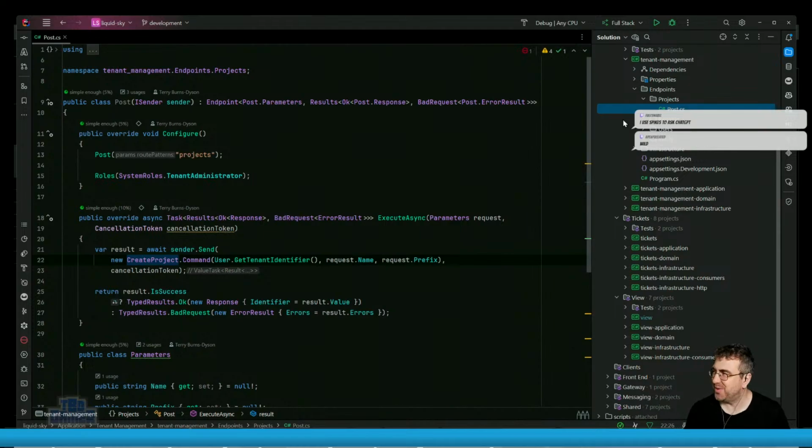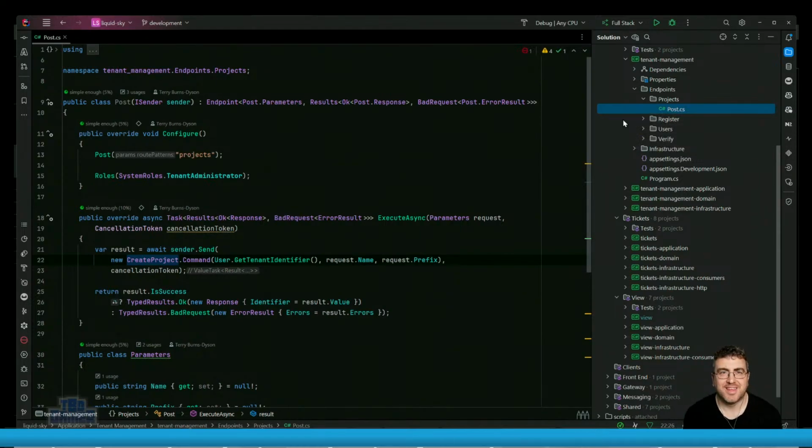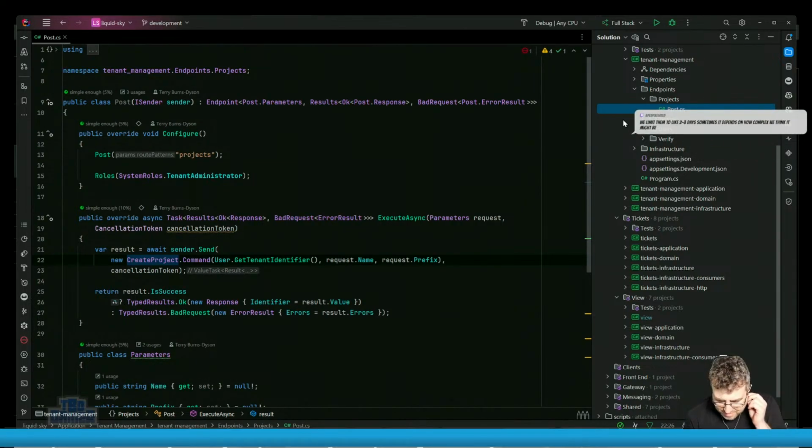Björn Schnabel, hello, how are you doing? Yeah. Spikes shouldn't be pointed because, again, you should understand, like, you're trying to find out what you need to know. So we limit them to 2 to 3 days.